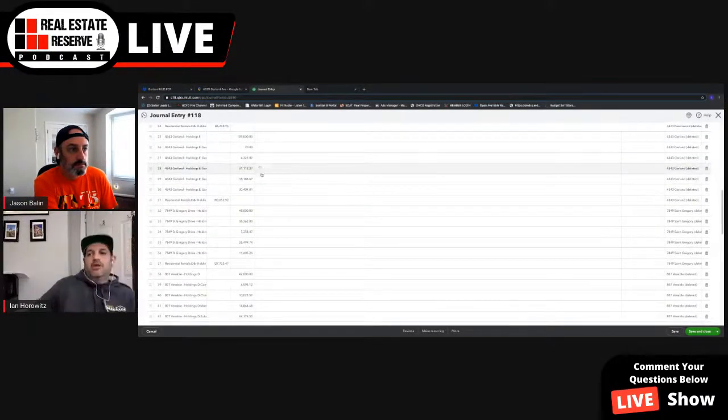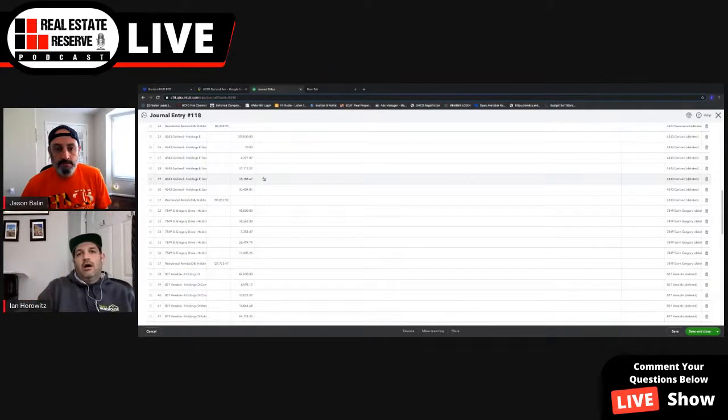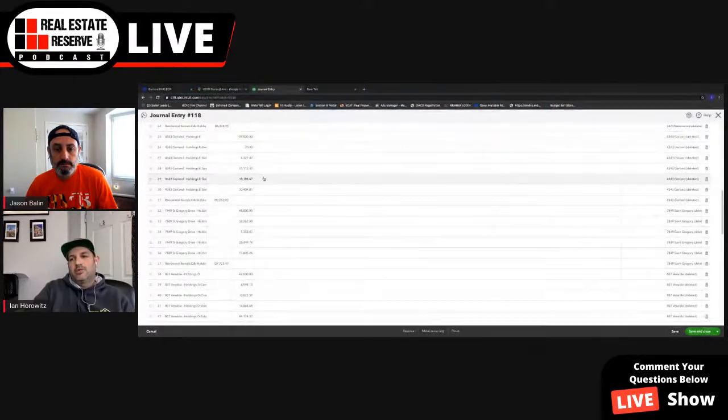The other problem is, you know, sometimes when you have two houses, we did this and another property right next to each other, accounting can get a little difficult with the 2 properties being close to each other, because the guy will go shop for both houses at the same time. So some of that cost overrun could be from that.